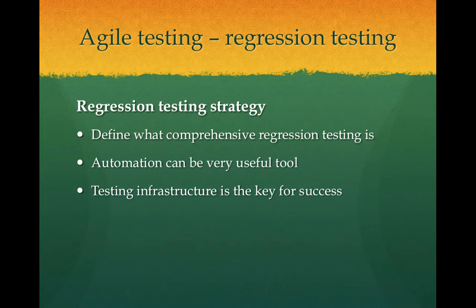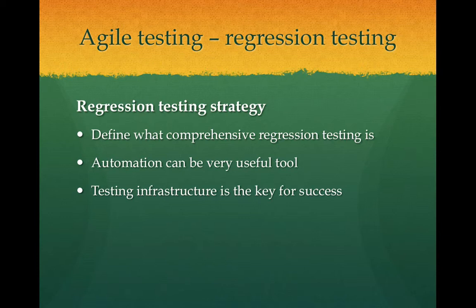What I recommend for this regression testing strategy — first, we need to clearly define what comprehensive regression testing is. This requires the dev team and test team to get together and think about what test results will represent the comprehensive status of the application. Once we see this list of results, we can tell if the application is in a good or bad state. This list depends on the context of your application — some applications are memory sensitive, some are load/stress sensitive, or sensitive about performance. So we need to think about non-functional aspects plus the functional aspects as well.